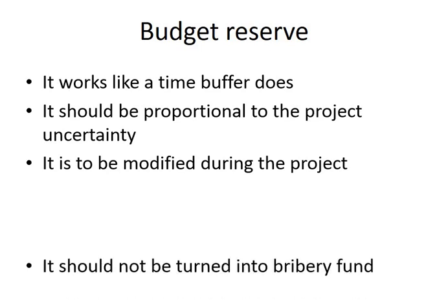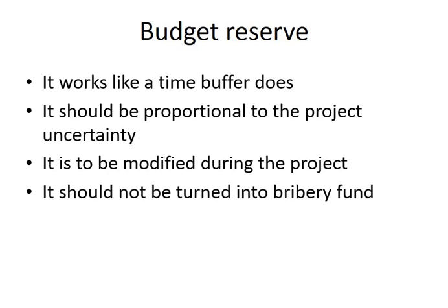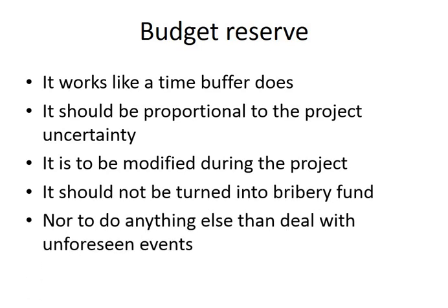But you need to calculate it, and to have it, you cannot spend it on anything else. This is what it is. So, some money for unforeseen circumstances. If nothing like that appears, then you move this money to another project.